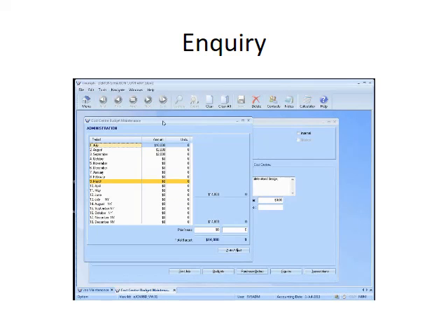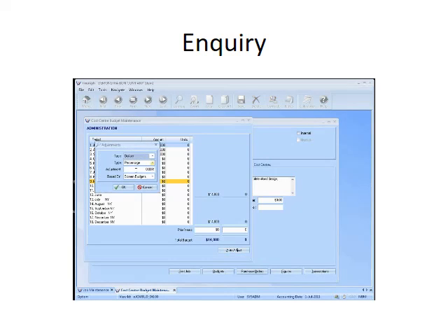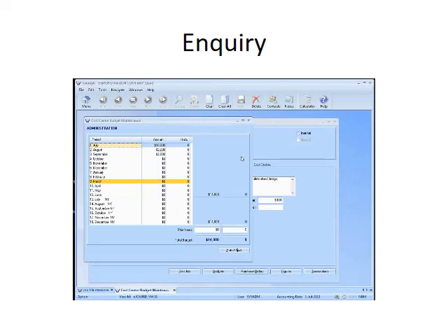We can look up the budget on a job, both by amount and by units, and you can adjust the budgets in dollars, units, or both. Based on the settings in the system, budget can either be done on a monthly basis, where you're linking it to your general ledger and the budget works in line with the general ledger period, or you can turn off the general ledger period type reporting and just have the budget for the whole job.